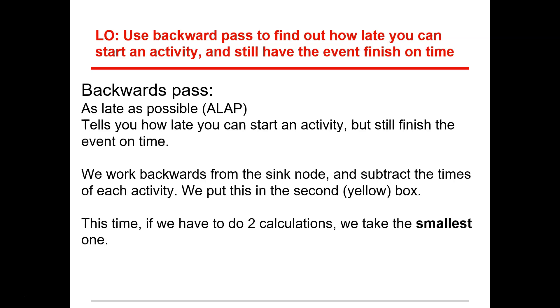So let's go ahead and do that to our one. This time though, if we have two calculations, we need to take the smallest one. So if we've got a node that has two different paths coming to it or two different activities coming to it, we need to take the smallest one. And we should get back to zero when we get back. Otherwise we know we've probably made a mistake somewhere.